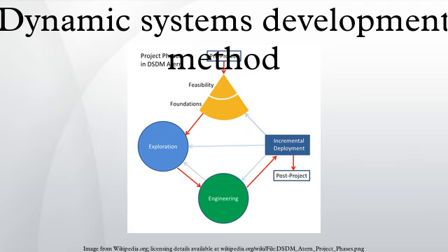First, there is the fact that it provides a tool and technique-independent framework. This allows users to fill in the specific steps of the process with their own techniques and software aids of choice. Another unique feature is the fact that the variables in the development are not time and resources, but the requirements. This approach ensures the main goals of DSDM, namely to stay within the deadline and the budget.